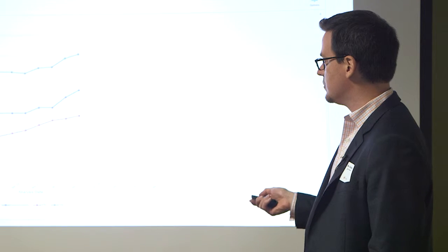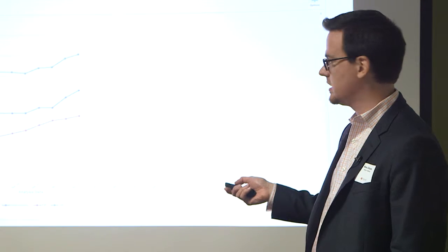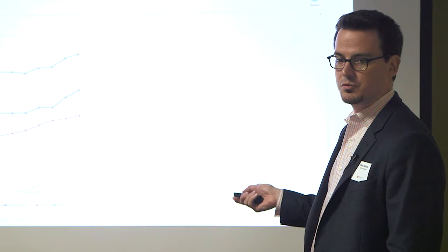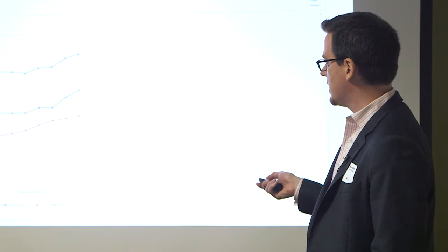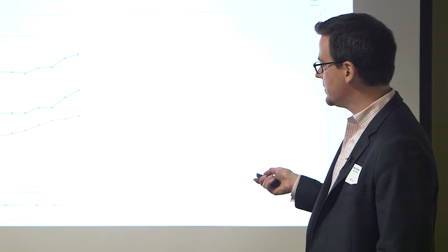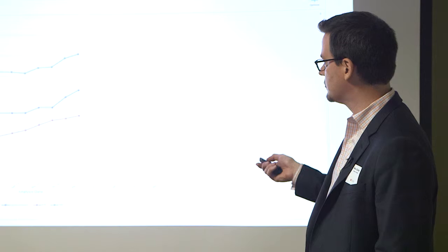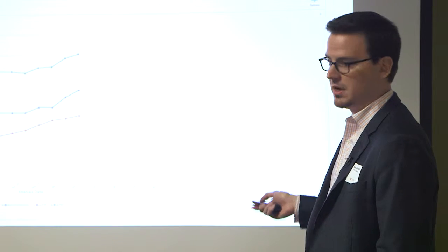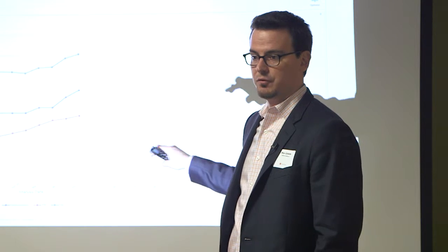What if I'm able to get a view of this project risk trend over time, right? So I've captured this data, I'm tracking my, pick whatever P-values you want, we're showing P20 and P80. What if I'm able to track that over time and I can see here, yep, something happened towards the end. What I can see is it's probably schedule driven. I've made some significant schedule changes that pushed out my date, but it also drove out my P80 and my P20, right? It's kind of a different way to look at this as my risk profile over time.